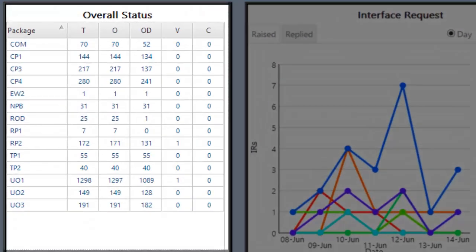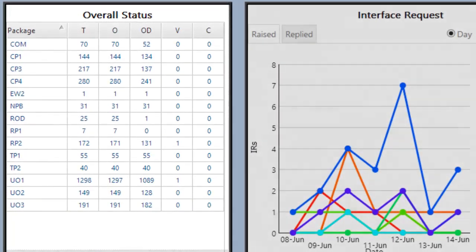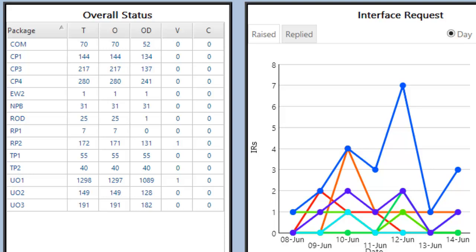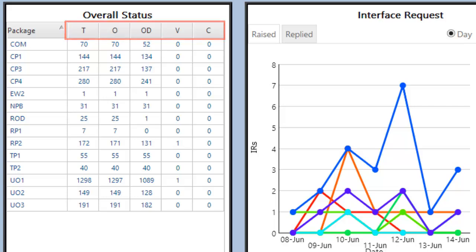First we will look at the overall status section which shows all packages or delivery teams for the project and shows the total, open, overdue, voided, and closed interface points for those packages.